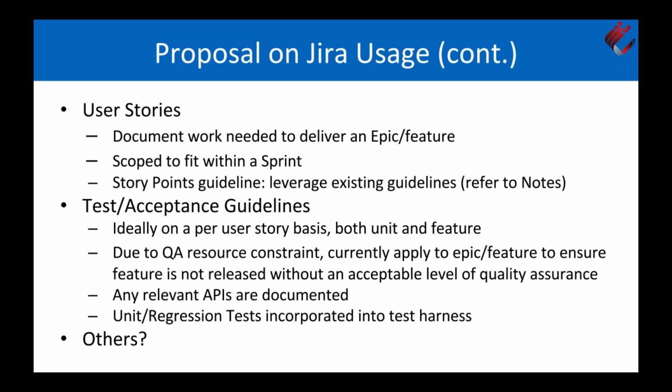Yeah, because what Bill's looking for is really more of a train-like release, right? So whatever is ready is released. But I think where we're at is, are we going to put a name on something that's not really tested? And I think maybe that's what we're getting at. Oh yeah, I'm totally into saying the features that aren't tested adequately, aren't documented adequately, and don't pass the acceptance criteria are not official features. They're just beta experimental features, and we don't recommend that anyone use them for anything. And if you do, you can't expect any support until it becomes a fully baked, fully documented, fully tested feature. That's exactly the idea. Yeah, I think that's a really good idea.